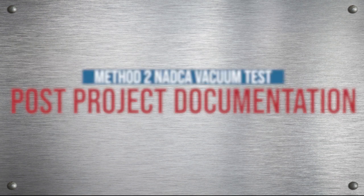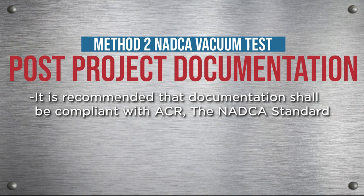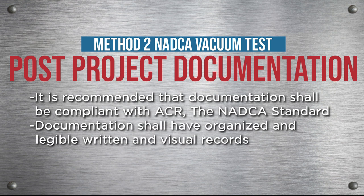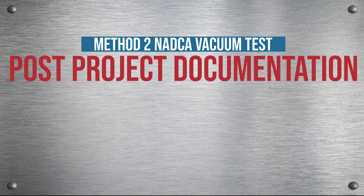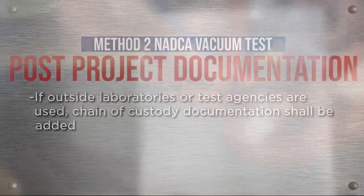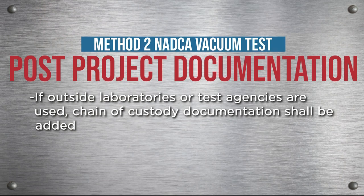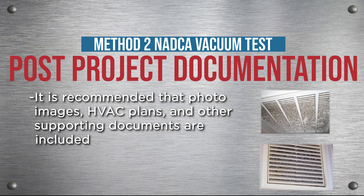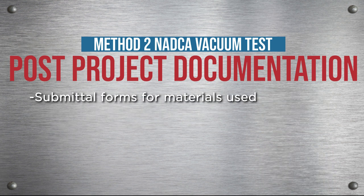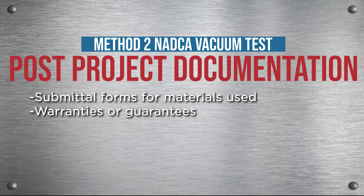Post-project documentation: it is recommended that documentation showing compliance with this standard is provided for all work performed. Documentation can include organized and legible written and visual records. If the NADCA vacuum test is used for cleanliness verification, a copy of the lab results shall be included with this documentation. If any outside laboratories or testing agencies are used, chain of custody documentation shall be added. It is recommended that photo images, HVAC plans, and other supporting documents such as submittal forms for materials used and/or warranties or guarantees are included as part of post-project documentation.